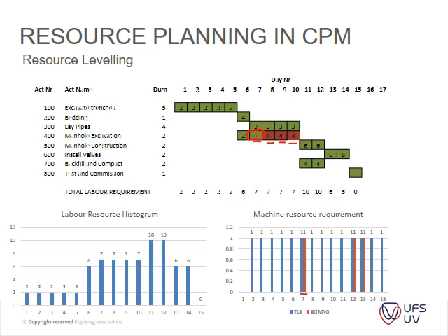So what happened was we took away the 1 TLB on this 1 day, and we added 4 laborers per day to this item for 4 days, so our labor increased to 7 on these days. That's what changed.